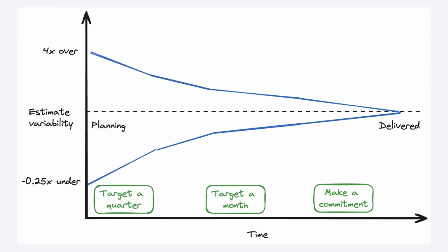And I think making commitments when it's the right time to do it is actually a really powerful thing to do, because it's like a compromise. Well, compromise sounds bad. It's like a deal between the stakeholders in the business and the people who are delivering the work to say, we'll work to a target, and in exchange, so will you be flexible enough to allow for us to work to a target that's called a quarter or a month or whatever. In exchange, as we get within, I don't know, a month, 2 months, it depends on the nature of the work, we will actually make a commitment and we'll drive really hard to get to that commitment.